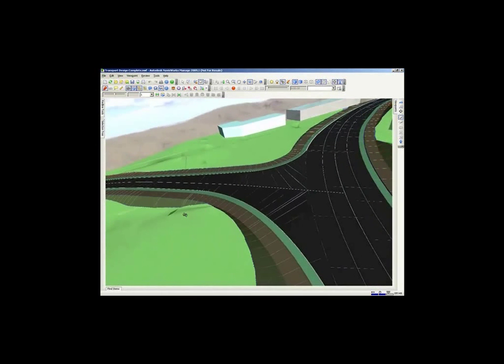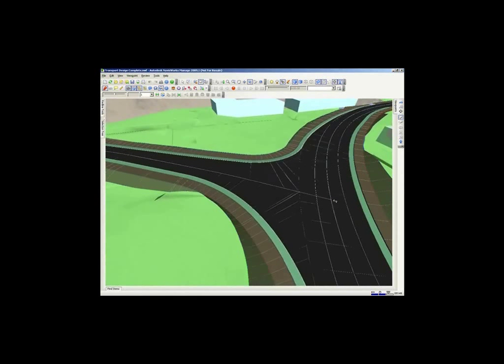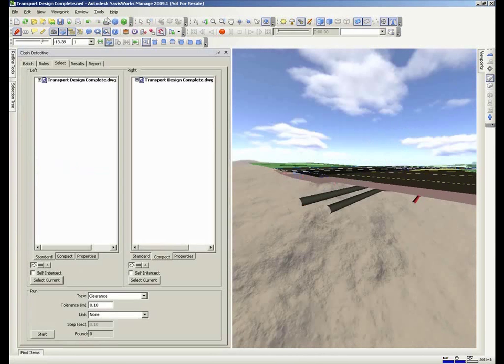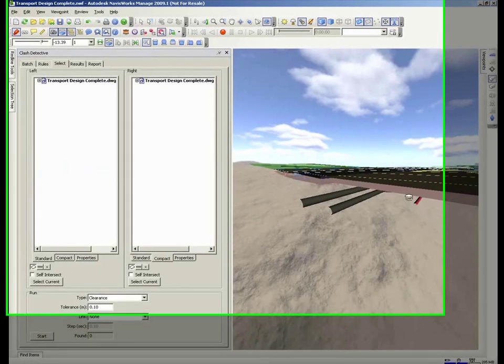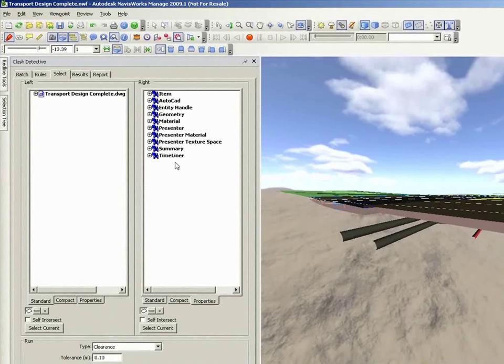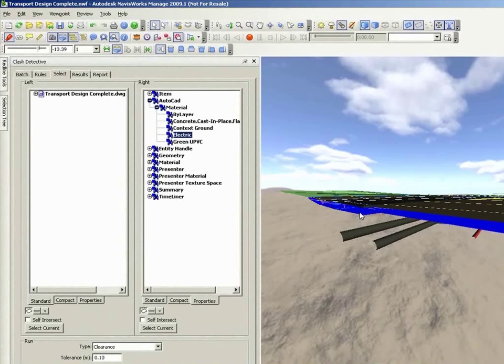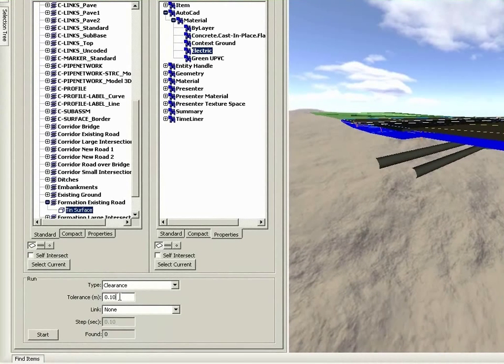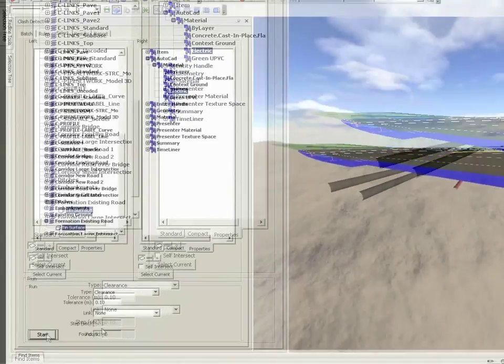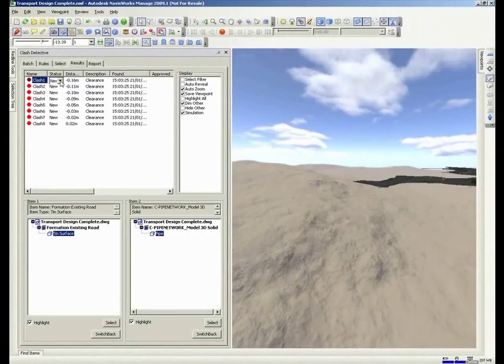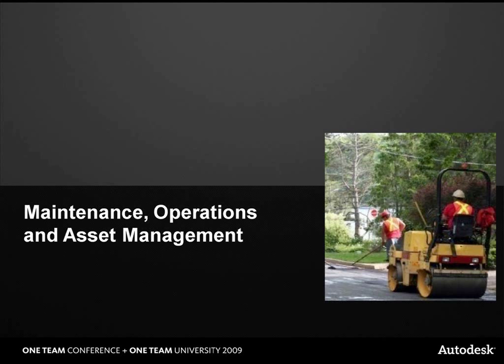While the design team generates the model that's used to build the project in construction using Civil 3D, utility companies and municipalities may provide information to the construction management team that locate sanitary pipe networks, gas lines, and telephone lines, to name a few. Using Autodesk Navisworks Manage in the field provides a real-time whole project view. The goal is to anticipate problems in the field before construction begins. Using Navisworks, the construction manager is able to integrate information from different sources and use the clash detection feature to perform interference checking to highlight potential problems before the contractor begins work. Information on clashes is displayed in a table and also graphically.